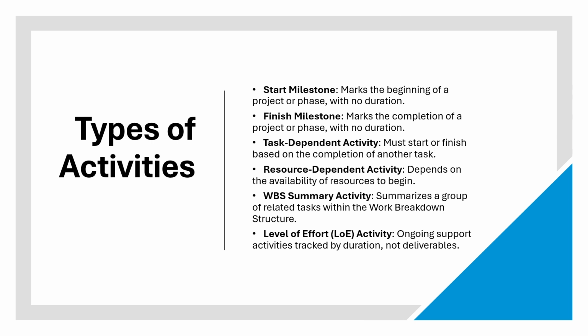Also, we have resource dependent activities. This means that when you have more resources, the activity duration will be smaller. So they basically depend on your resource. For example, you have to construct a wall, and it requires 10 days if you hire one labor. But if you hire 10 labors, then it will take 1 day to complete this wall. So it depends on your resource, not on a task.